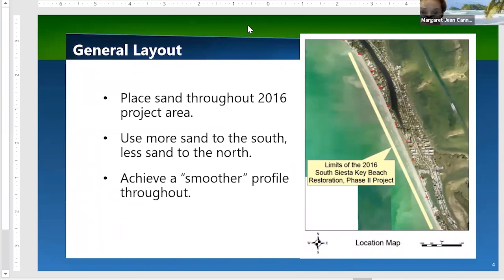Question: Is the sand color part of why dredging was a bad idea? In this case, the main reason for not dredging is the volume — 92,000 cubic yards is almost exactly 10 percent of what was placed during the initial restoration in 2008. It's not economically feasible to get an ocean-going dredge for that smaller volume. Mobilization costs for those boats these days are four or five million dollars just to get the boat to your community.